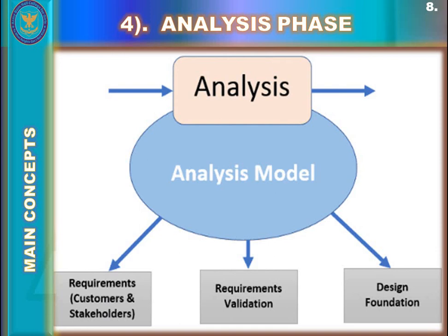Although gathering requirements is the main activity, there are other important activities during this phase. The project team creates an optional document that helps transition from the analysis phase to the more technical and detailed design phase. This document is called a conceptual system design. It provides client feedback into many of the ways that the final solution will be implemented. This feedback includes much of the look and feel of the final solution.